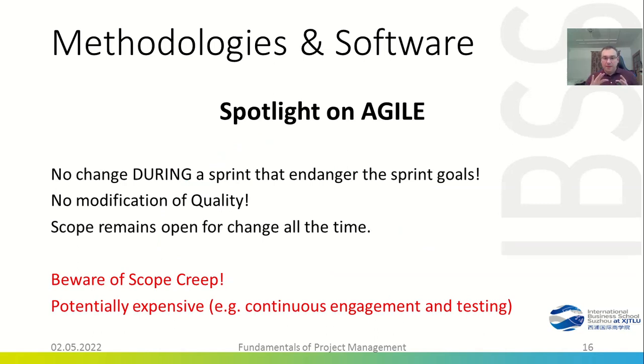Now, in every single sprint, we need to set several goals. And any change that would alter these goals is prohibited. We can't do that during the sprint. And we will not allow any modification of quality. The scope, however, remains open for change.